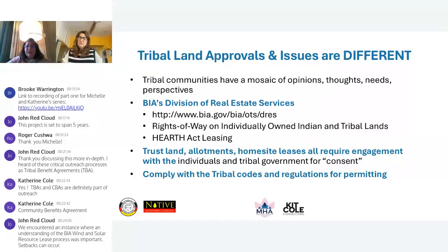And then you need to communicate, depending on what those regulations are. There are certain timing letters that have to be written and prepared, and there has to be a response back. And sometimes in allotments, there could be multiple allottees. And sometimes some are deceased.